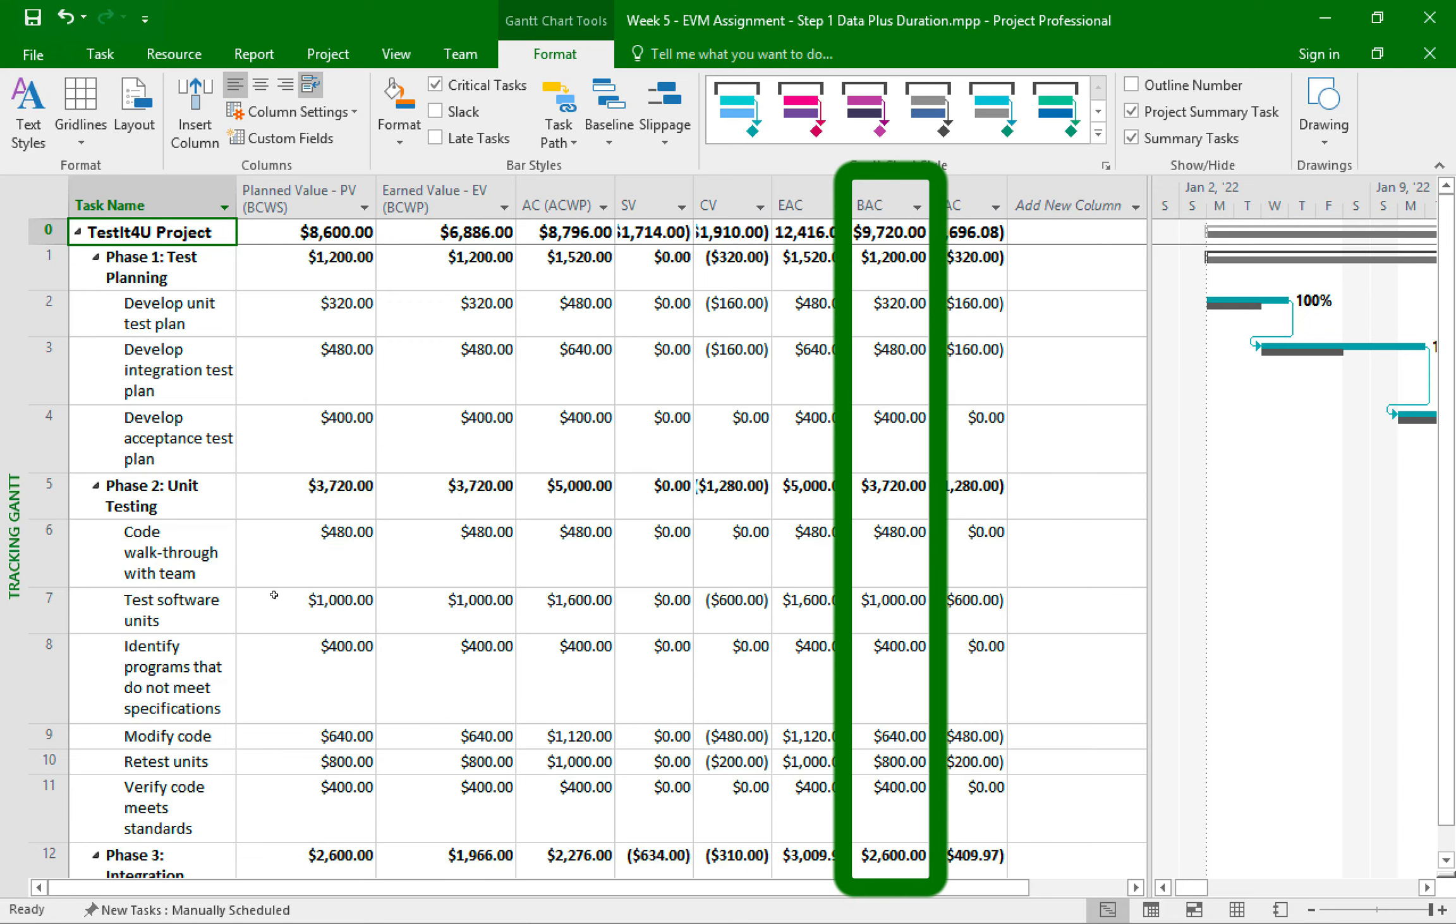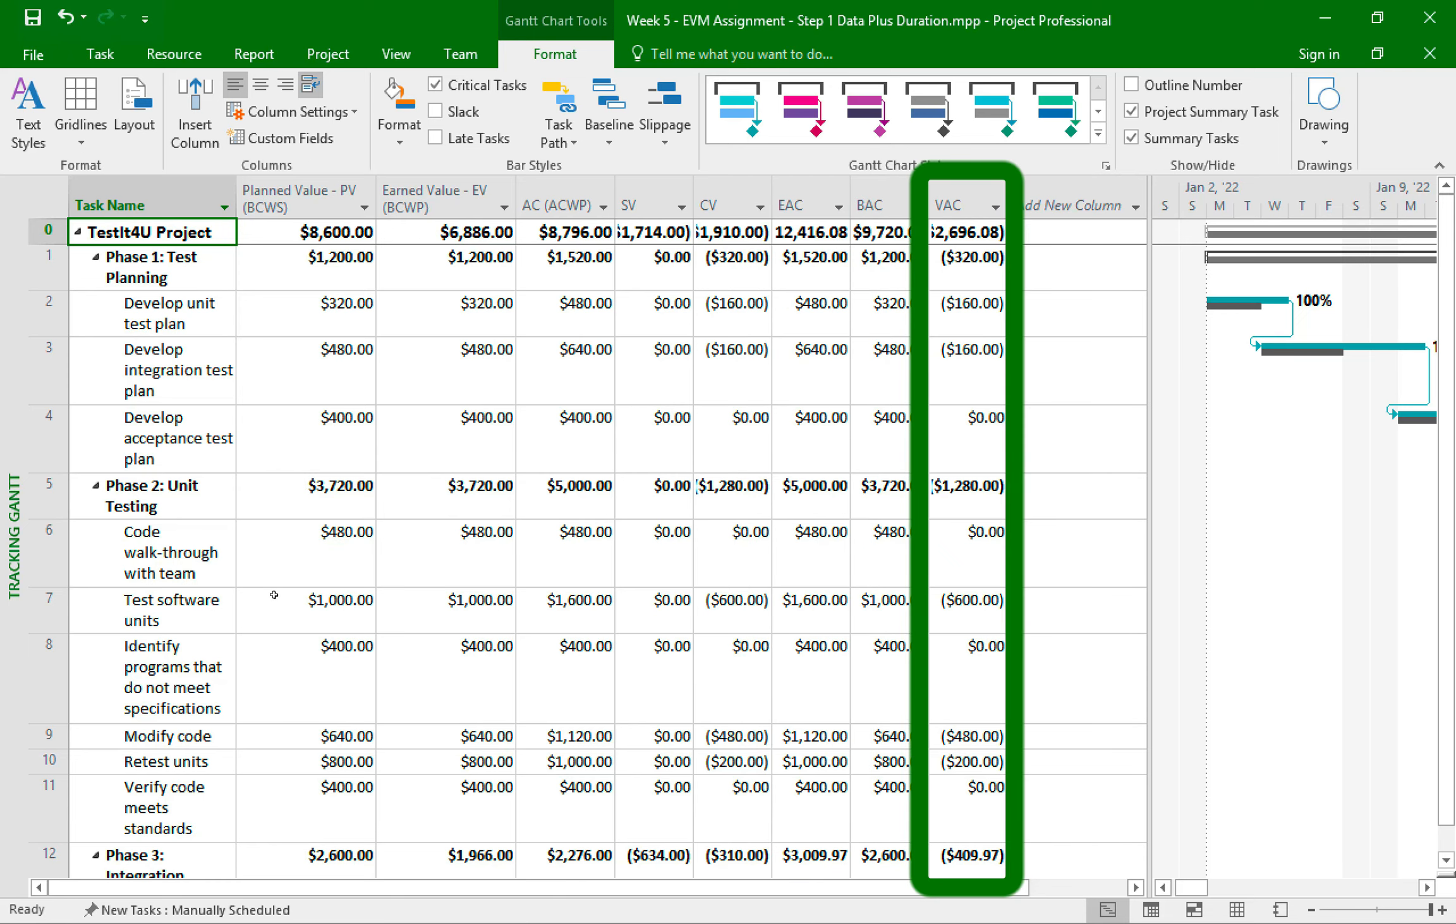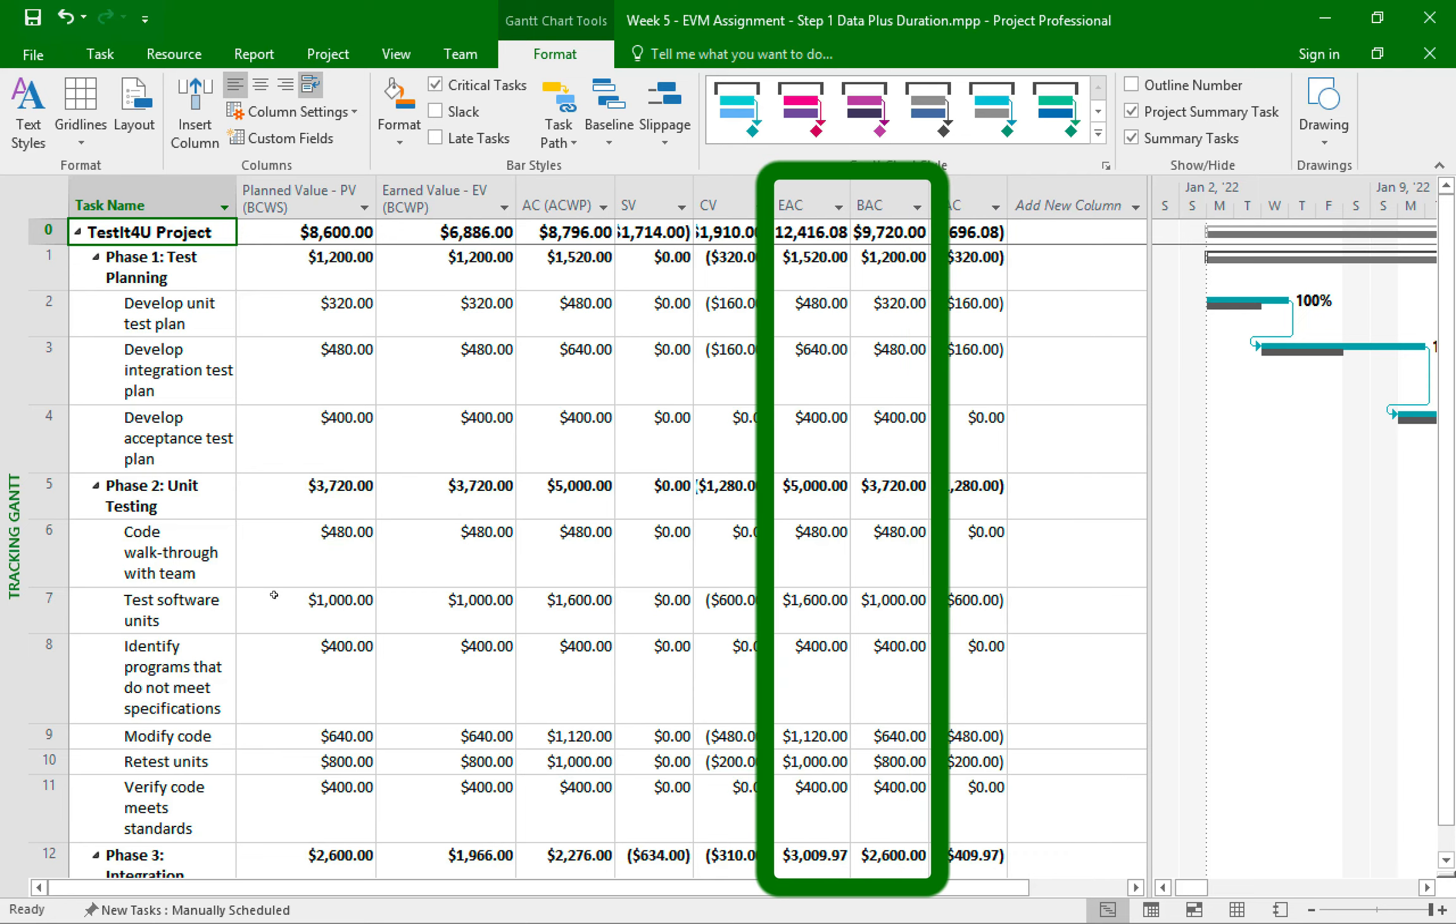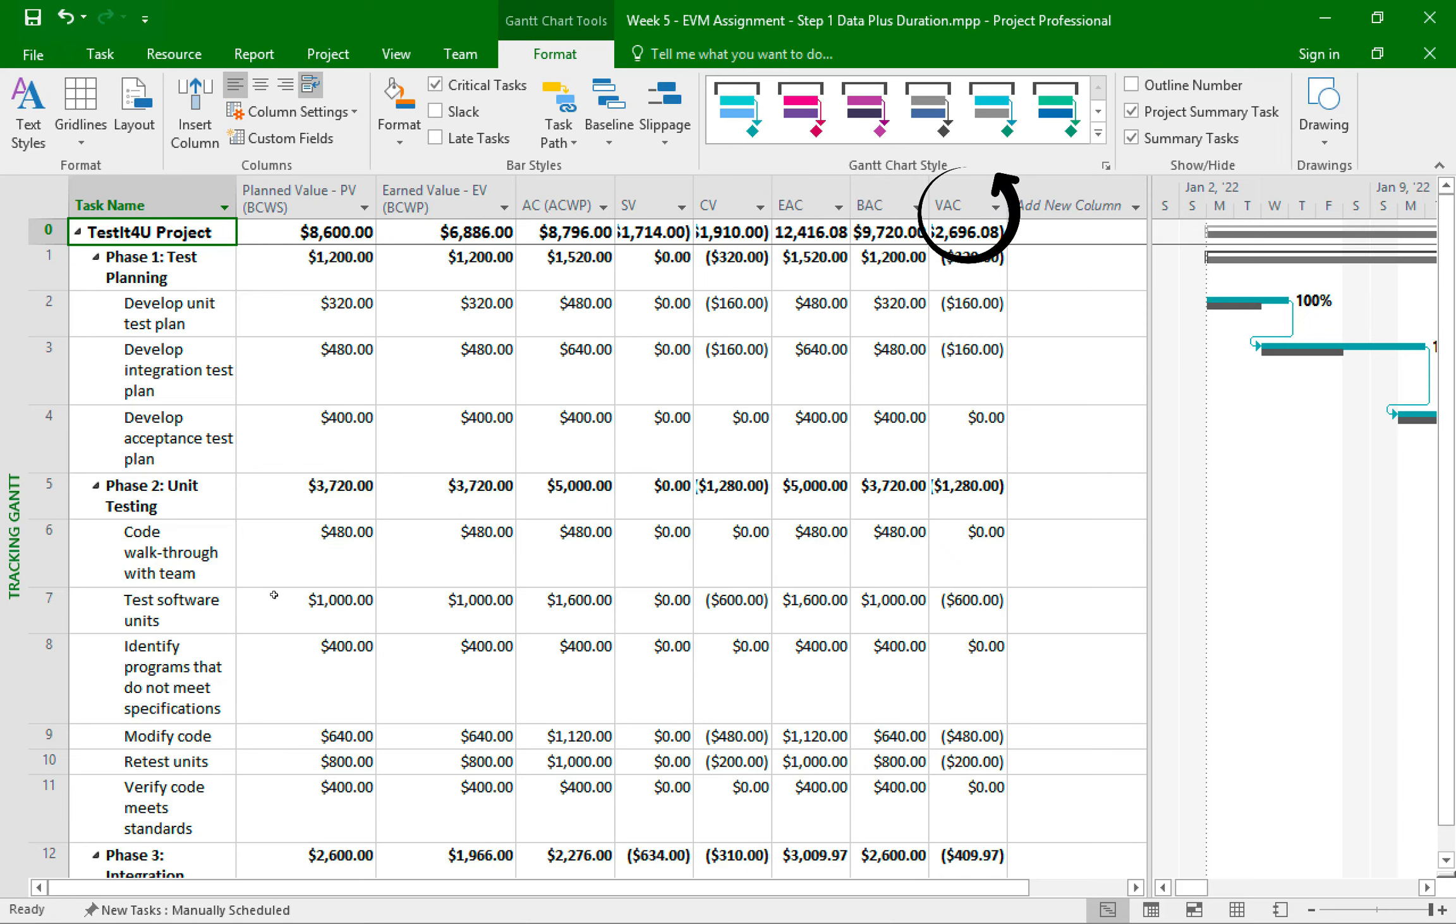So the budget at completion is the planned budget we gave our project at the very beginning. The estimated at completion is the expected budget after we made the updates. And the variance at completion shows the difference between these two columns. So it seems that we had estimated that the budget for this project will be this value. But after we made updates to the duration, it seems our costs will now be this value. Which means we are over-budget by this amount. Now, of course, this is not ideal, but these are the numbers, and that's what they mean.